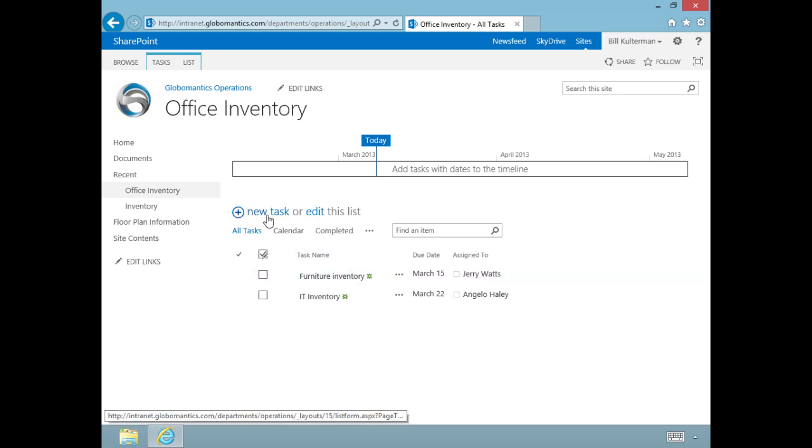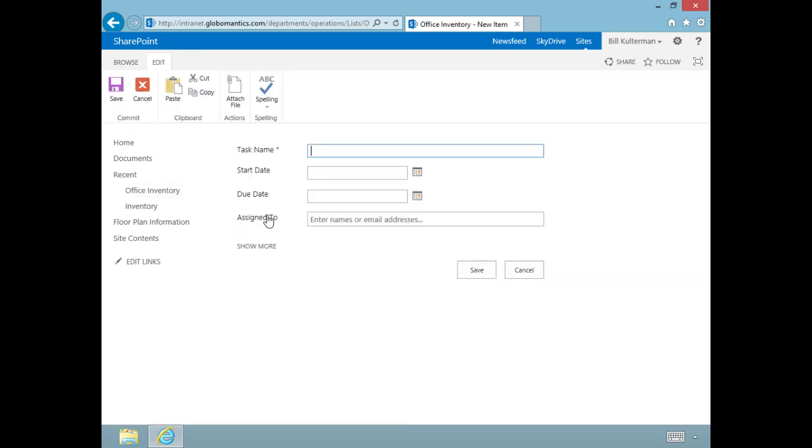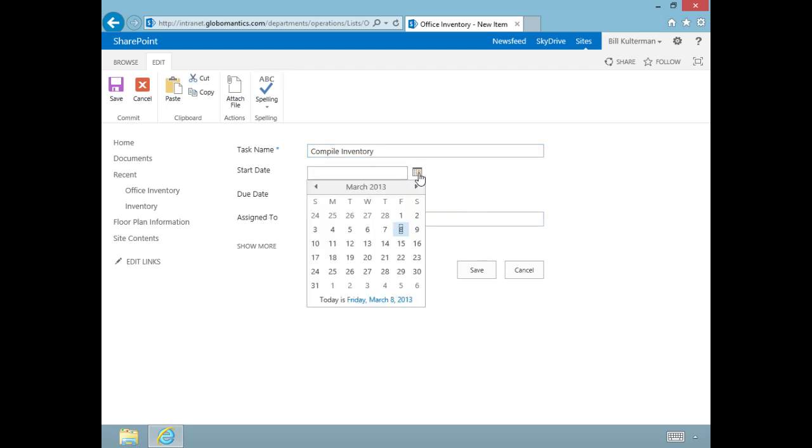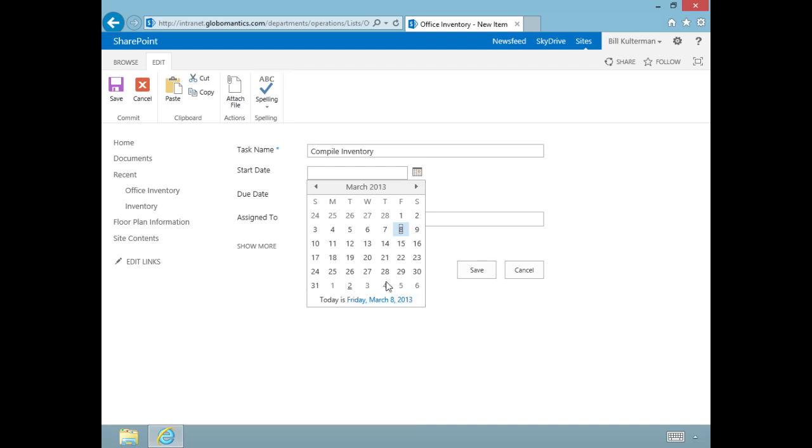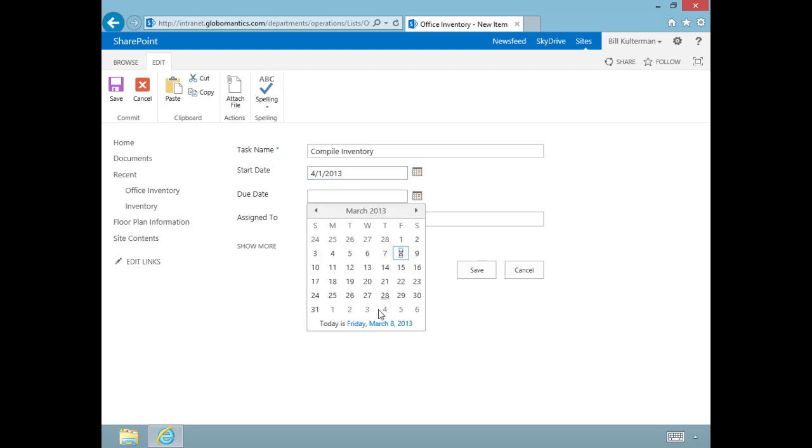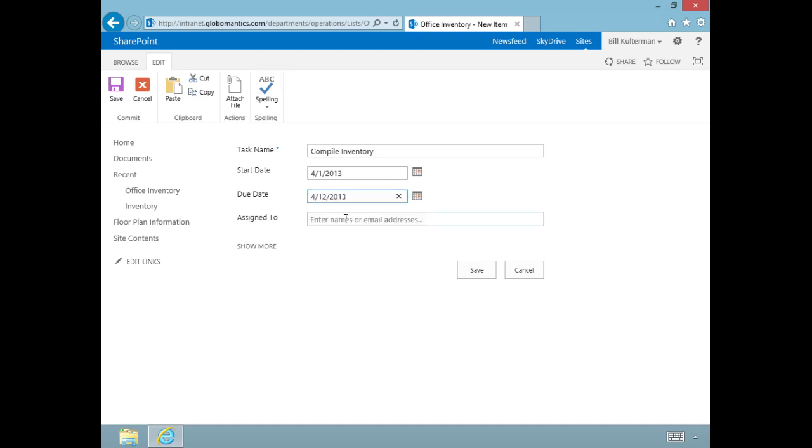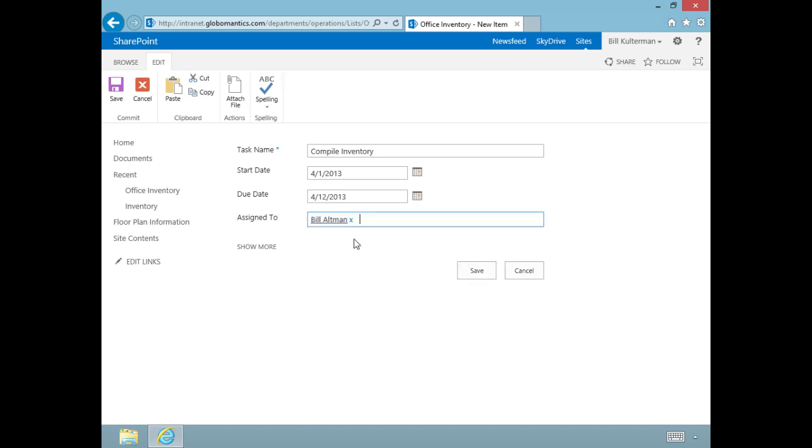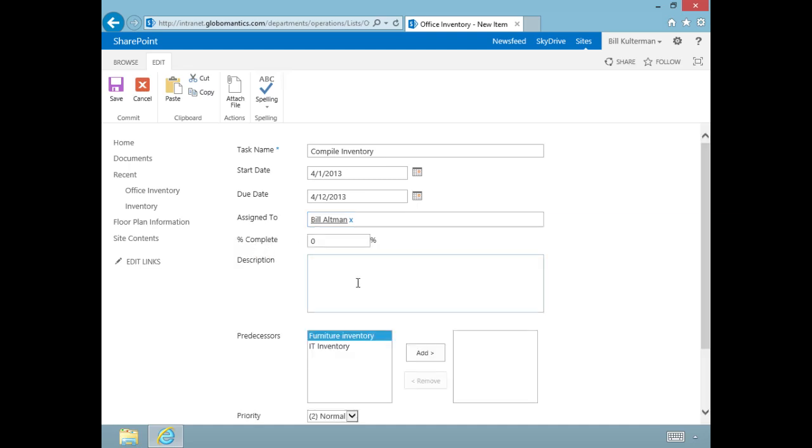Let's add one more. This one is going to be compile inventory. The start date for this one, let's make it a little later, on April 1st, and it's going to finish April 12th. This one is assigned to Bill Altman, our director of operations. If I know Bill, he's going to pass this job off to somebody else. Let's click on show more here.